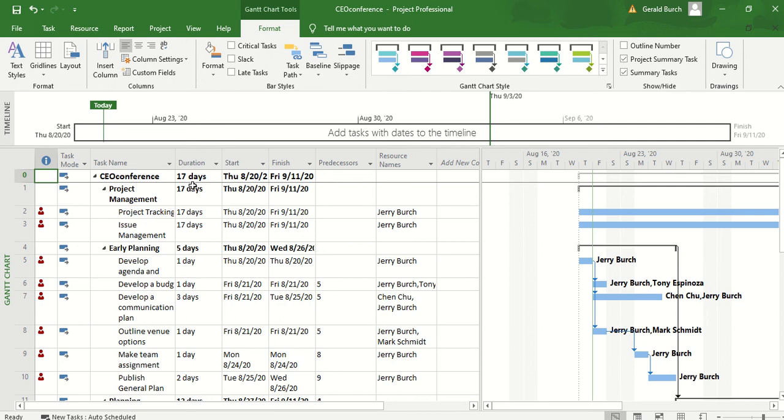Your numbers are going to be different for you or whoever else that you have in the system. So if we're going to do 450 hours worth of work and I can only do 32 hours of work a week, immediately we can see that this is not going to be able to get done in 17 days. The truth is it's not even going to get finished in 13 weeks. So I need to start thinking about how do I extend some of these days so that I can make things more available for me, and work out through these constraints what's going on.